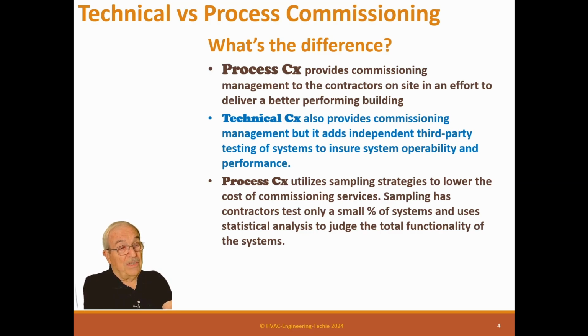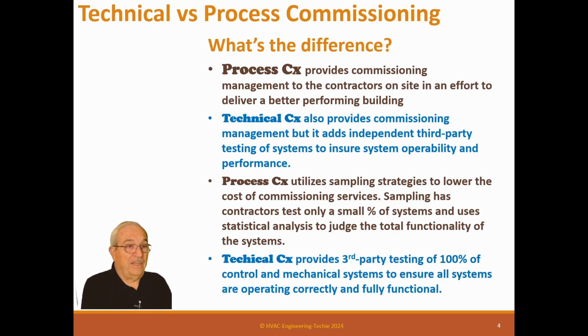So whenever a customer says, well, we want to lower the cost, so we want you to sample, then we ask, well, what is your failure rate? What failure rate will you accept? They say, well, none. I said, then you can't sample. If you want it all to work, then you need to test everything. It's really simple, but unfortunately some people don't get it.